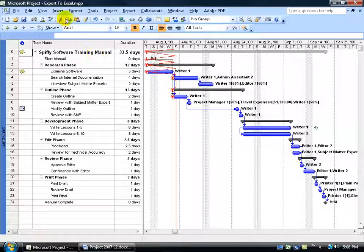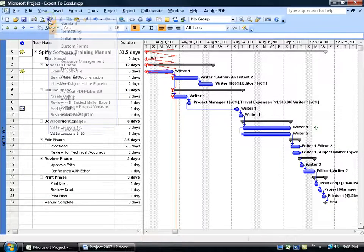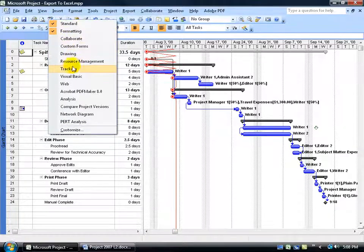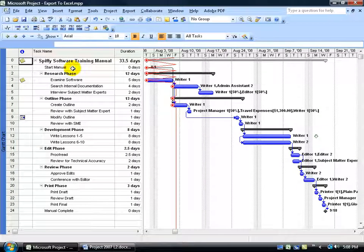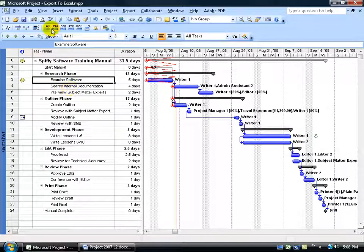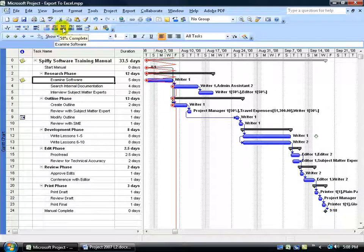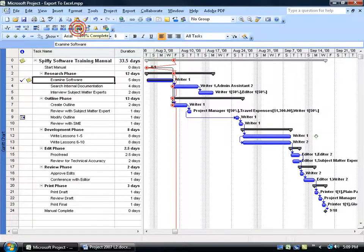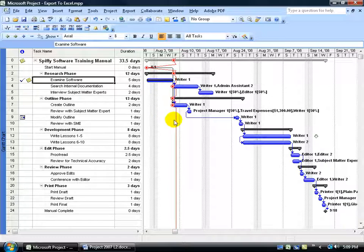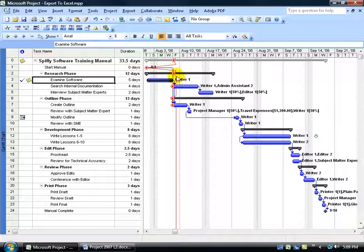I'm going to come up here and right click on any one of these toolbars and go down to tracking. This is one way that you can go ahead and enter task progress—select the task and then come up here and check whether it's 75% complete, 50% complete, or 100%. Notice how that progress line for that particular point in time, that status date of August 8th, now instead of going back, shows that it was completed at that time. In fact, maybe just a little ahead of schedule because now it's bending over to the right.